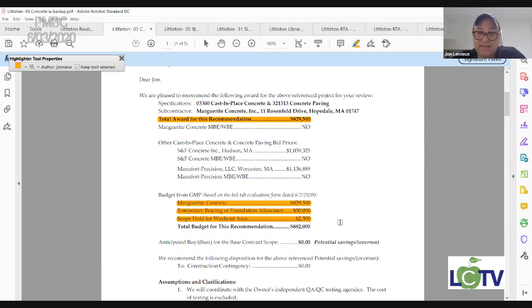Basically, that means every time the concrete comes to the job site, they dump the load into the footing or foundation or floor slab. There's always that little bit of washout that takes place. They hose off the inside of the truck, then the guy dumps it. He doesn't want your concrete getting stuck in his truck, and they don't want him to bring it back to the facility. So that gets dumped out somewhere on site, and they have to pay to get rid of that. So this is a hold for that work that will take place later on.